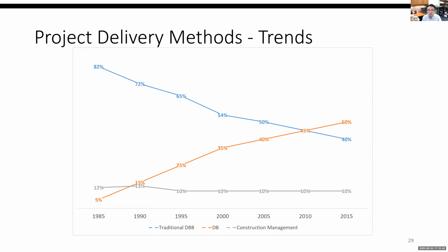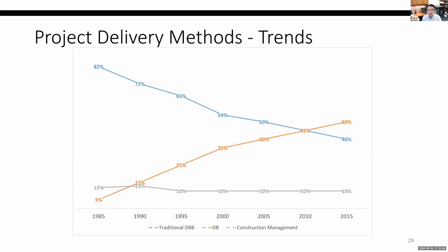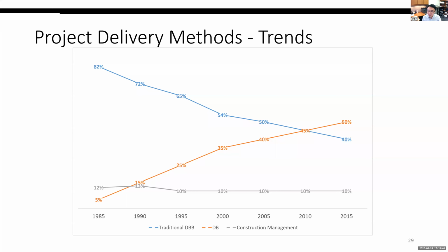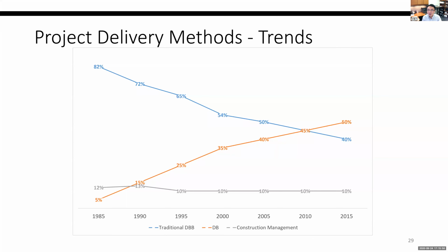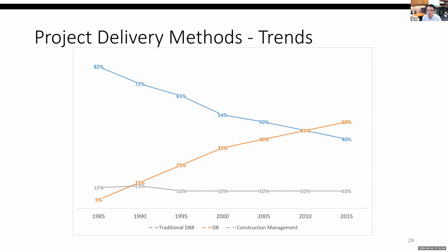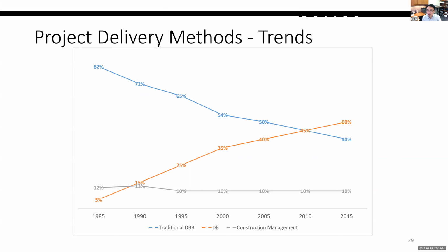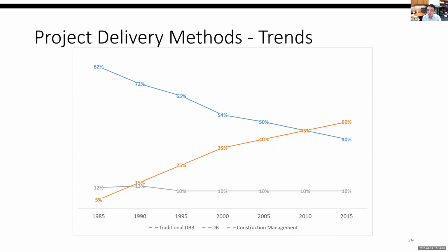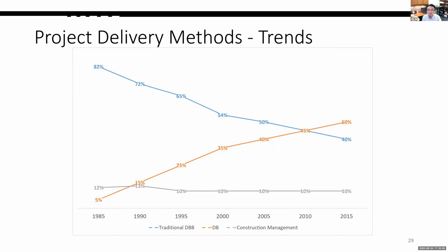Should I just report it as profit? No, I will create a dummy account, create a lot of dummy cost items, to balance, zero up my cost. I will still on paper make my cost look like $10 million. You guys got the point? So zero budgeting is actually a practice to cover up the profit. Because of that, IPD is extremely difficult.